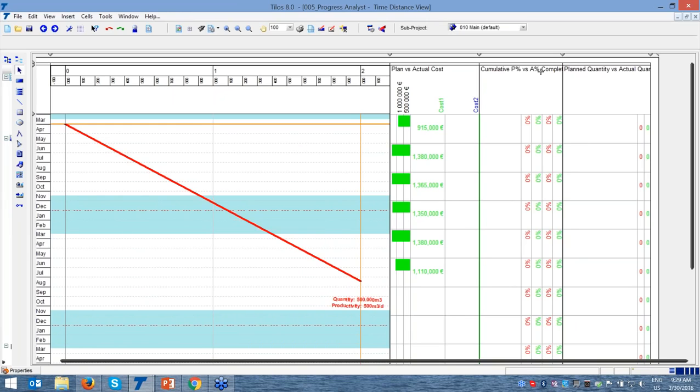That's why I also want at least one criteria which helps me to measure my payments, not to overpay my subcontractor or my other team, because I want to set up some safety factor, which is quantity. Because if my subcontractor is telling me 50% progress done, I need to have some criteria so that I can agree with him what 50% means. It means how many cubic meters of excavation, because I can easily measure the cubic meters instead of the percent complete.